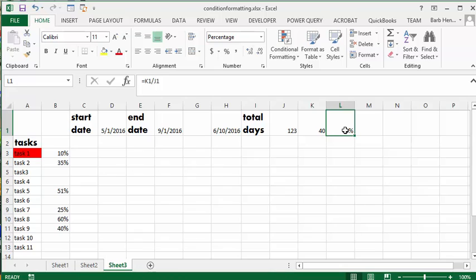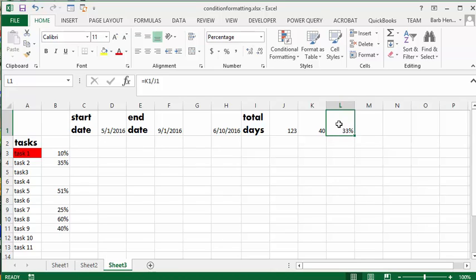I've done a little formula here dividing the days that we've gone so far divided by the total days of the project, and we get a 33 percent complete in time. I have this conditionally formatted so that tasks—the percentage complete put in by the project managers—are indicated here.